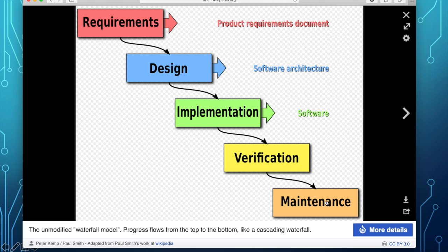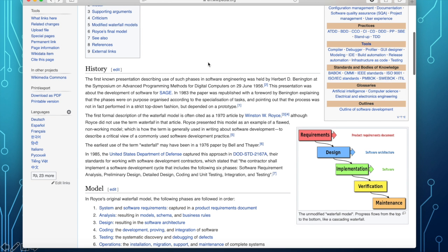So in 4 weeks' time, you will produce a prototype of the first iteration from which the client can test. And once the client says it is correct and it satisfies his requirements, then you get the next set of requirements. So that's how the waterfall can be applied to Agile. Sometimes it is called the micro waterfall model. All right, so you can adapt that if you like.